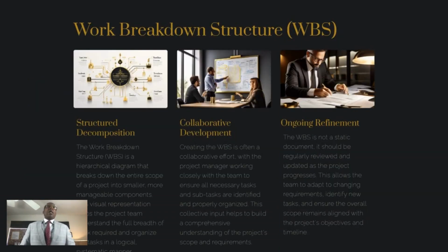Work breakdown structure, sometimes called WBS. This is a hierarchical diagram that breaks down the entire scope of the project into smaller, manageable components. As you'll see, you have a top, and then it just gets smaller and smaller. The reason I like the WBS is when it's collaborative, meaning everyone is getting involved. It's not the project manager sitting in a silo saying, okay, these are all the tasks, let me put it in a WBS and then come back to the team. No. That's not how you build a WBS. I've seen it done that way. I've done it that way, but it wasn't accurate.